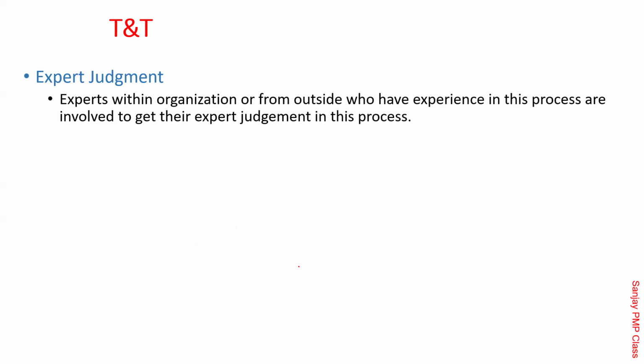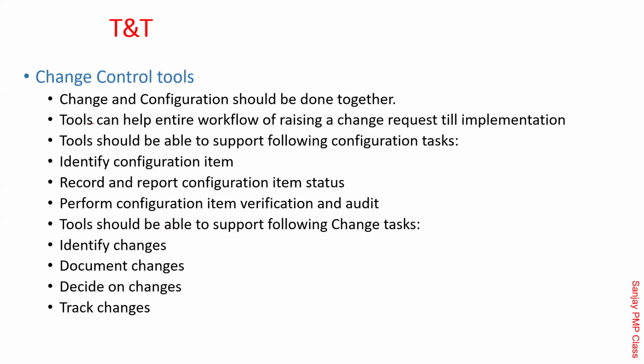The CAB needs expertise. That's where the panel is sitting there. They are technical experts. They are the people who are able to take financial decisions, the people who are able to take technical decisions, the people who are going to get impacted because of any such changes. All those are together, and that's why it's a panel. It's not an individual. So the CEO of the company cannot play the change advisory board, because he would have authority about the money, but he has no idea whether such a thing could be done on an HP server. He doesn't know, so technical people are required. That's why it's a panel, not an individual.